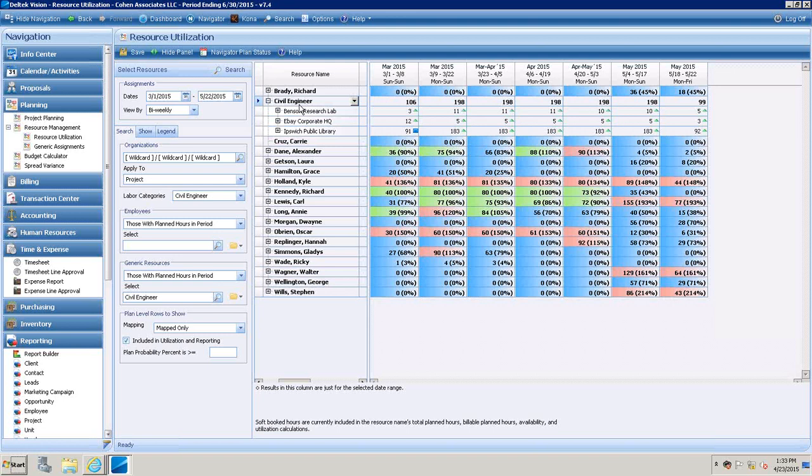And then those changes are being made by whoever has the security to assign the work or to assign the utilization, if you will, of those particular jobs. So great question, but it's not necessarily a tiered approach. We've seen it more in process be tiered, where the project manager makes the request, and resource managers formally take action and execute that assignment of work.